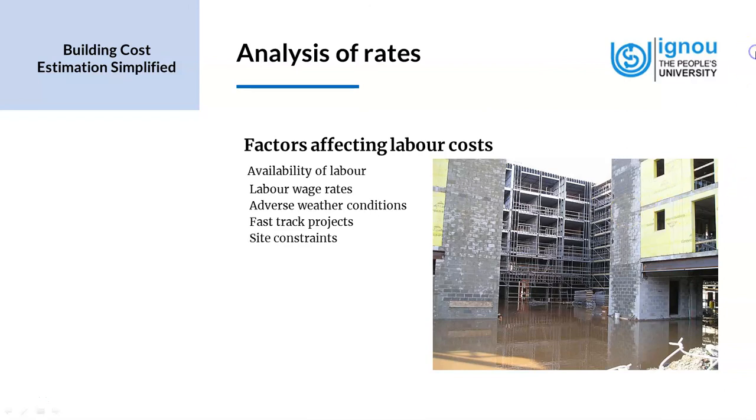Now, the next is site constraints. This could be one of the demands made by the contract by the client. Sometimes in projects where there is an already existing office building and where renovation has to take place, sometimes it would only be possible to do it after office hours, or maybe some of the jobs which are quite noisy will have to be avoided during the daytime, because the office is also simultaneously operating. So this can also affect the labor cost and has to be factored in while we are creating the estimate.